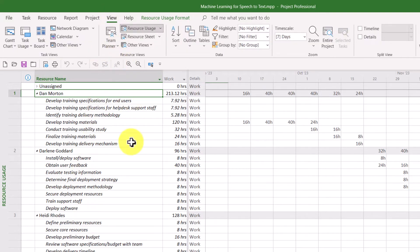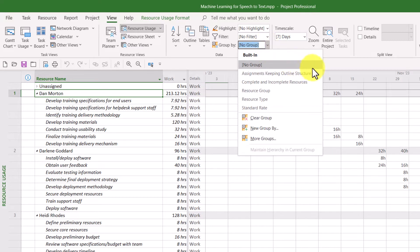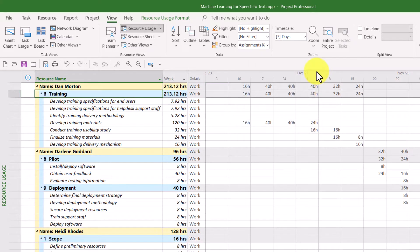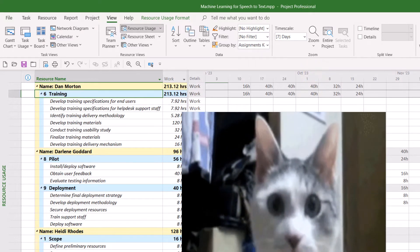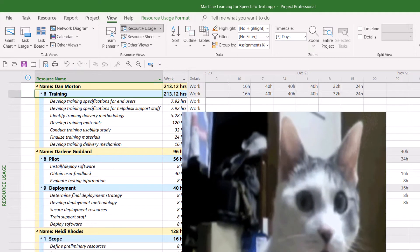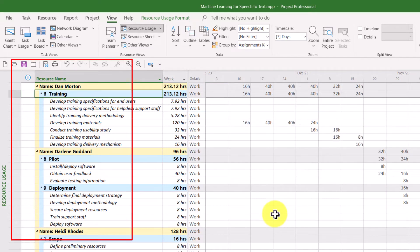Click the View tab to display the View ribbon. Then in the middle of the ribbon, click the Group By Pick List button and choose the group "Assignments Keeping Outline Structure." What Microsoft Project will do is display summary tasks using light blue cell background formatting.